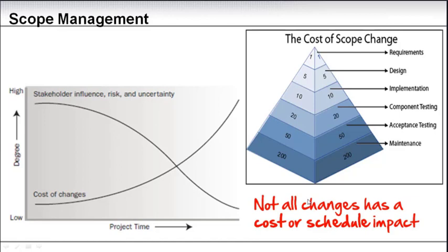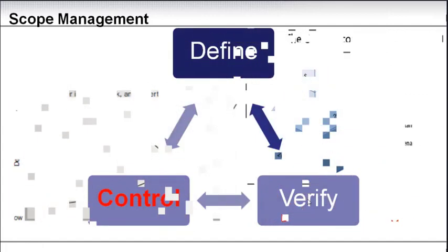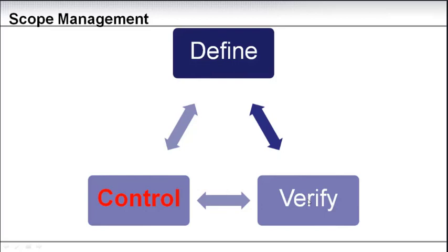Either way, it all needs to be raised up through the scope management process and documented, so for future reference, if someone asks what was the scope that this project achieved or implemented, you can go back, take the project charter plus any scope change request you have, and at the end of the day you have the full picture. So the scope management process must be in place and enforced, no matter if there is an impact or not.